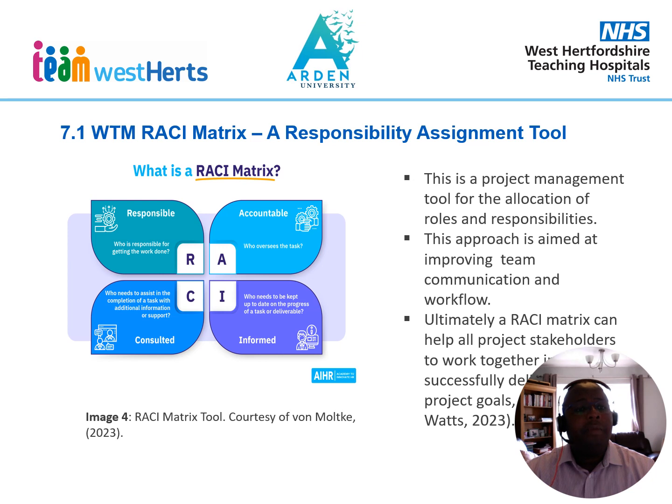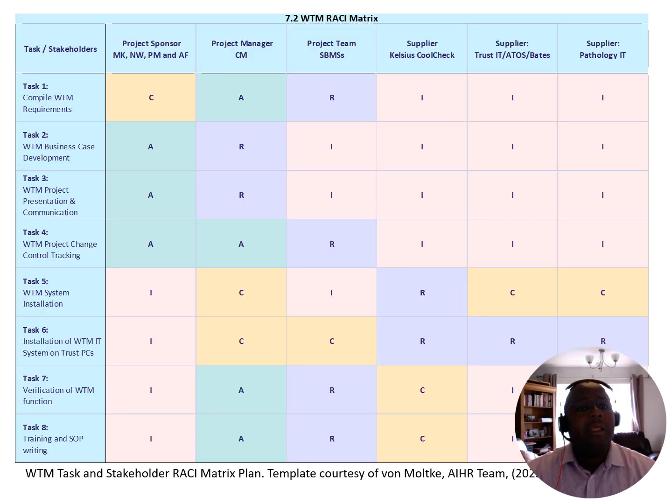So I used the RACI matrix, which is a responsibility assignment tool. The acronym RACI stands for responsible, accountable, informed, and consulted. So I used this tool to draw a RACI matrix for this electronic temperature monitoring project, and to identify who will be responsible, accountable, informed, and consulted among the stakeholders. So here is the wireless temperature monitoring RACI matrix.